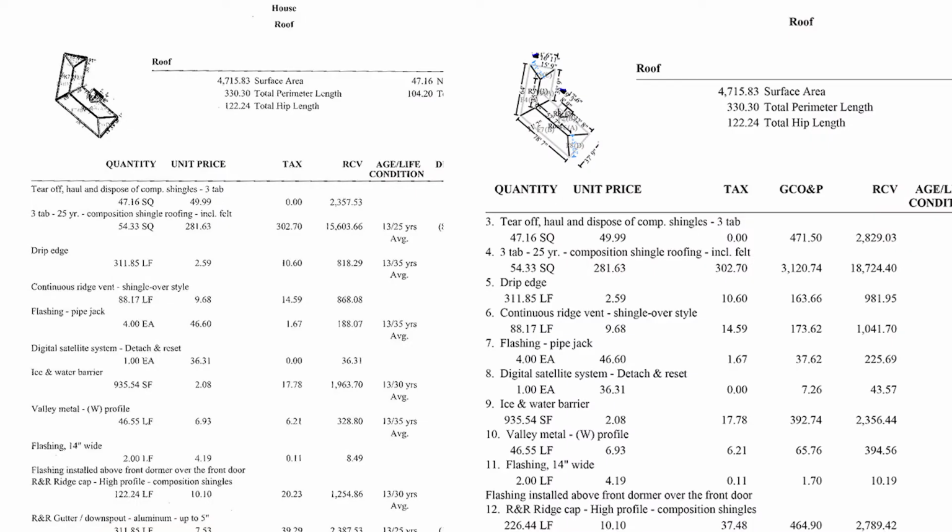We are going to keep going through the estimate. On the original here, it wasn't line itemed out, so they didn't have line item numbers, which is a little strange. We were able to say, hey, we sent them an estimate with each item numbered, and that makes things a little more clear. That way when we're talking, we can say, well, on item 20, to seal and paint the garage door, they did bid items, so they actually did not use insurance pricing for that. They used our subcontractor pricing for that.